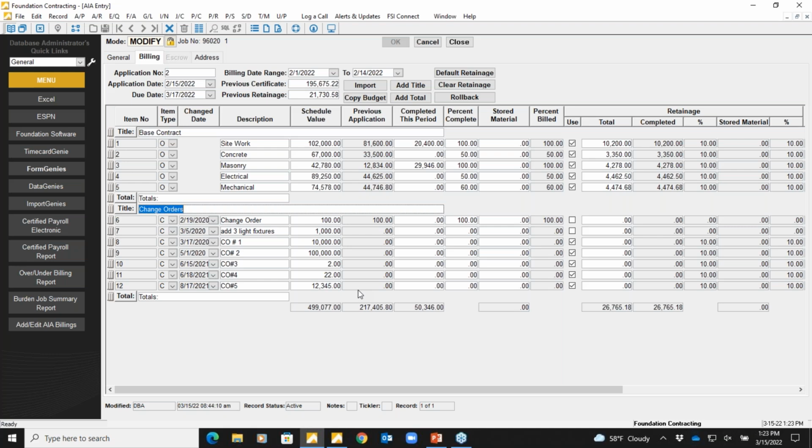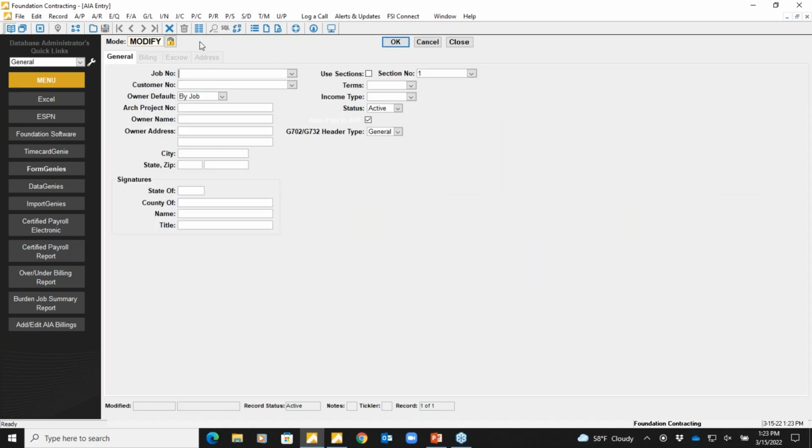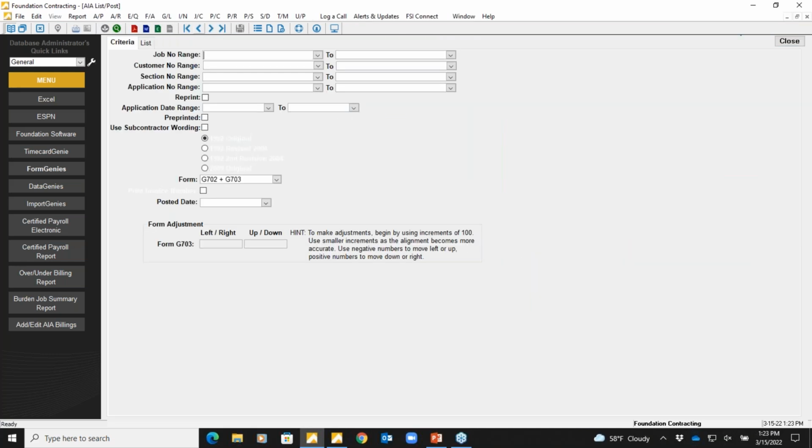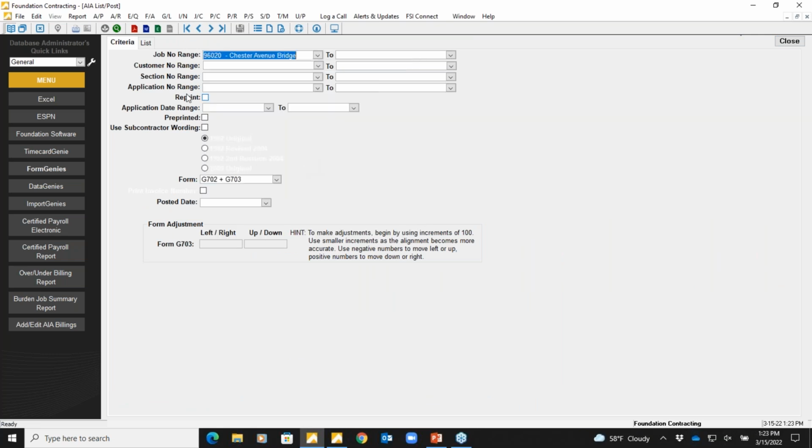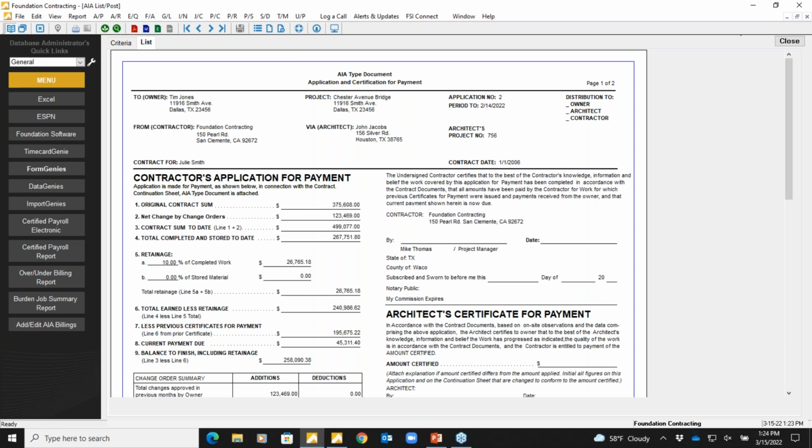And it's very easy to bill each line item. So I'm on pay app two, everything ships over the right way. I just need to come down here and either fill in my percent complete or fill in the completed dollar to date. Retainage, you're able to track throughout the system. And I'm able to produce this AIA directly out of Foundation. So it integrates with the accounting from the billing side, and then it also prepares this AIA invoice for me, so then I can submit that for payment.